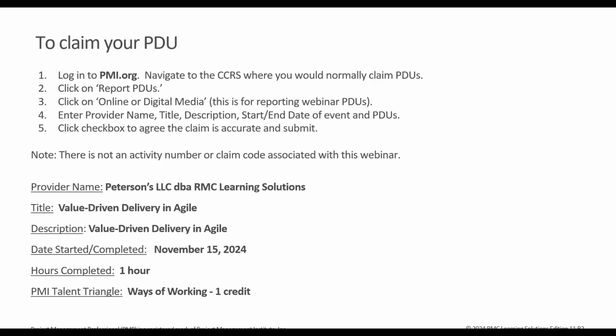It helps us in the ranking process. How did you arrive at that ranking? Well, these are our must-haves, these are our should-haves, these are our could-haves. It'll help you determine that. These are helpful, additional things that you can leverage to arrive at how your ranking is provided.